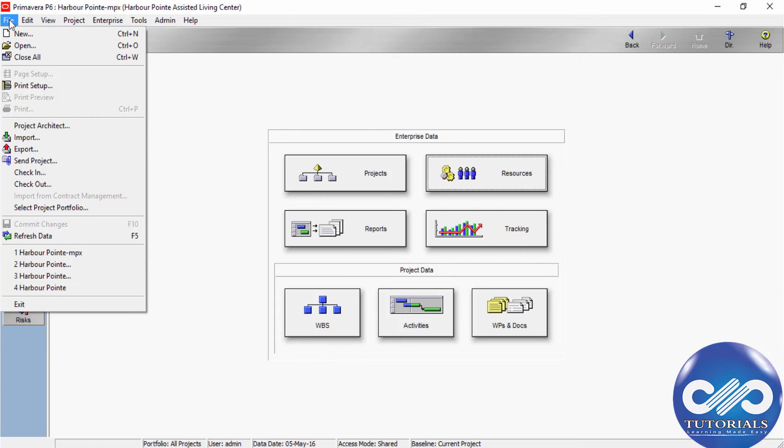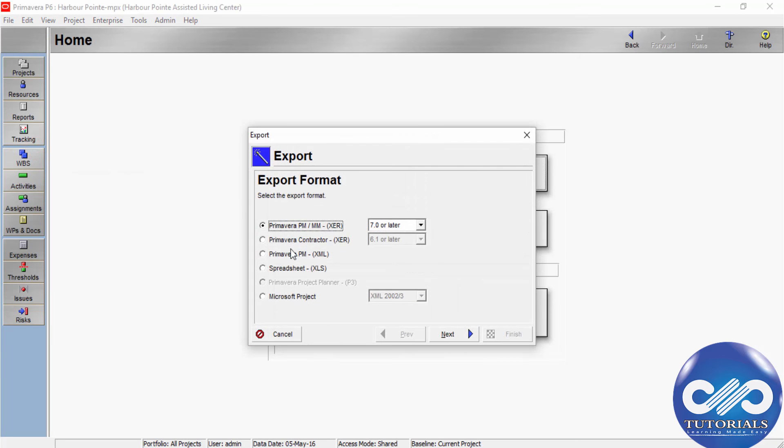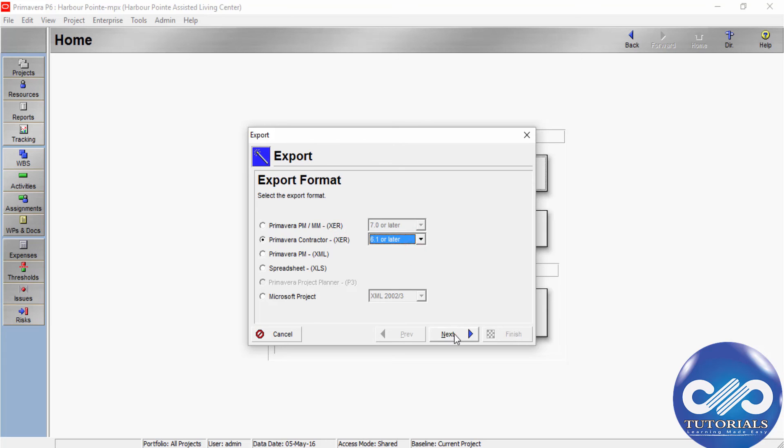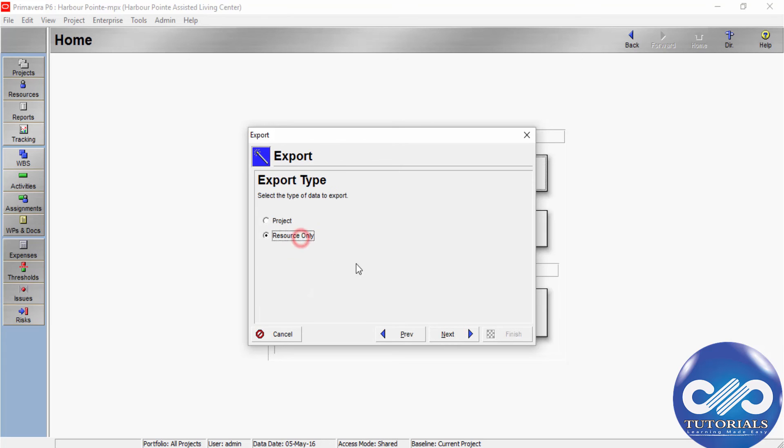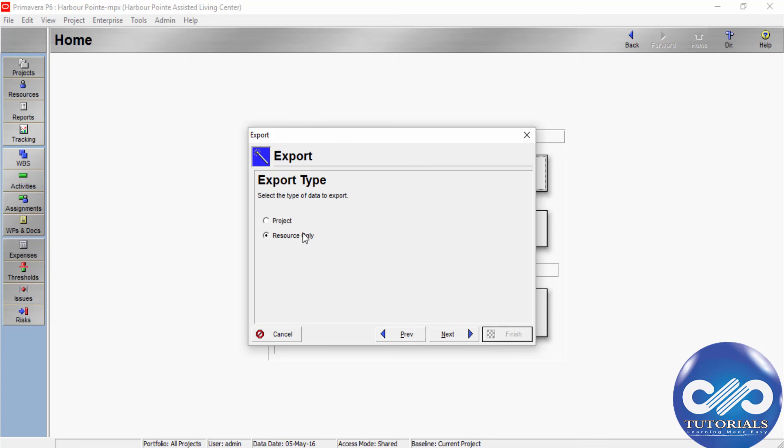To do that, go to the menu bar, choose File, click Export, and then choose Primavera Contractor 6.1 or later, and click Next. Then choose Resource Only as the export type and click Next.